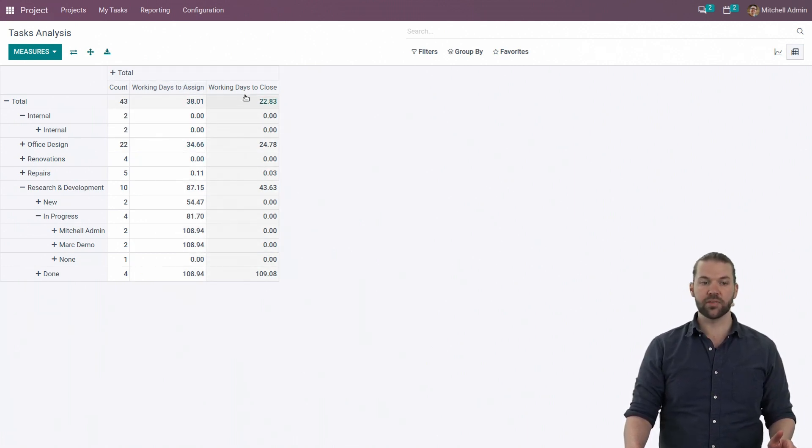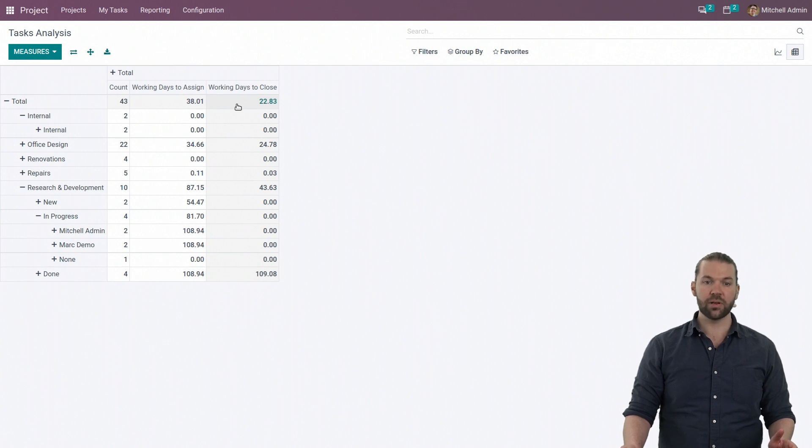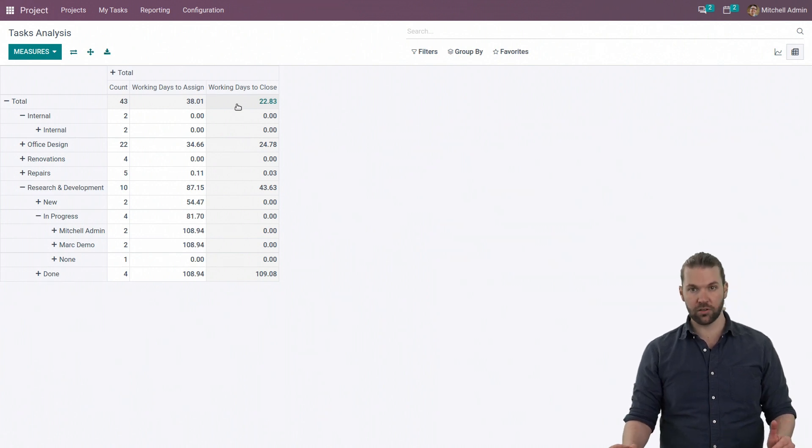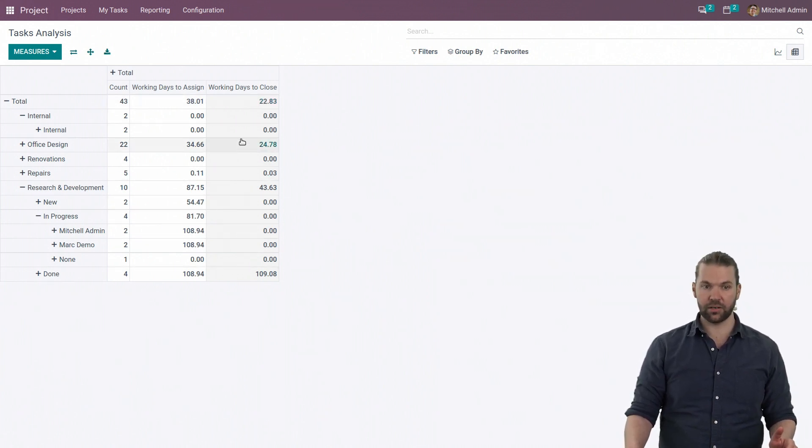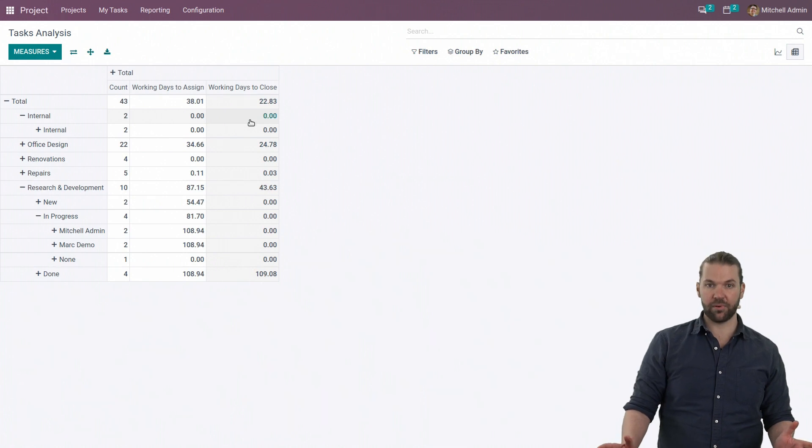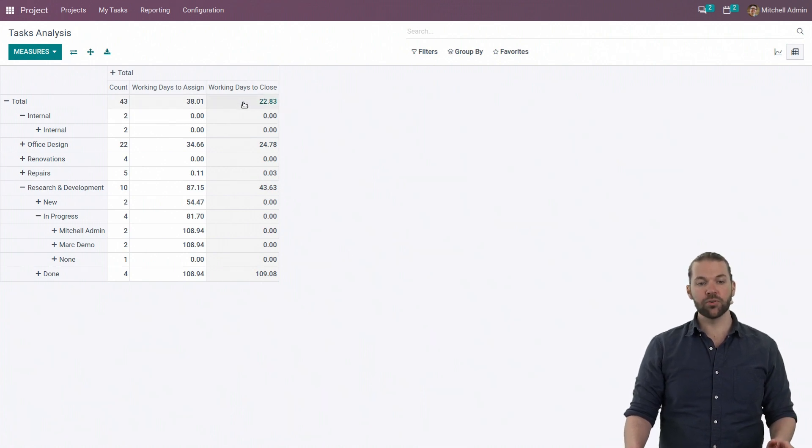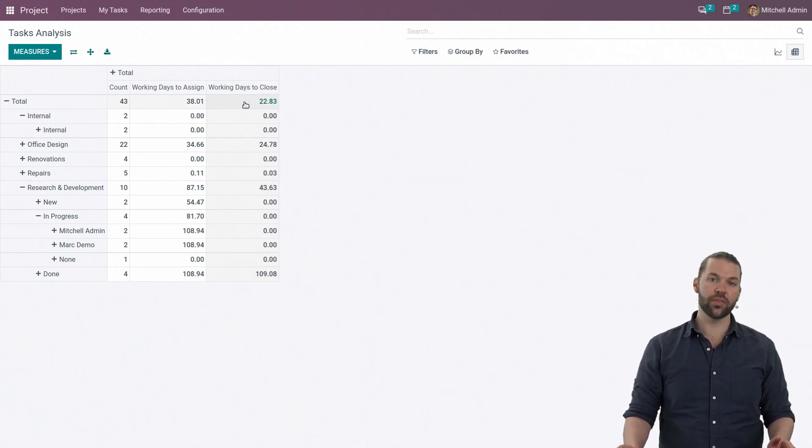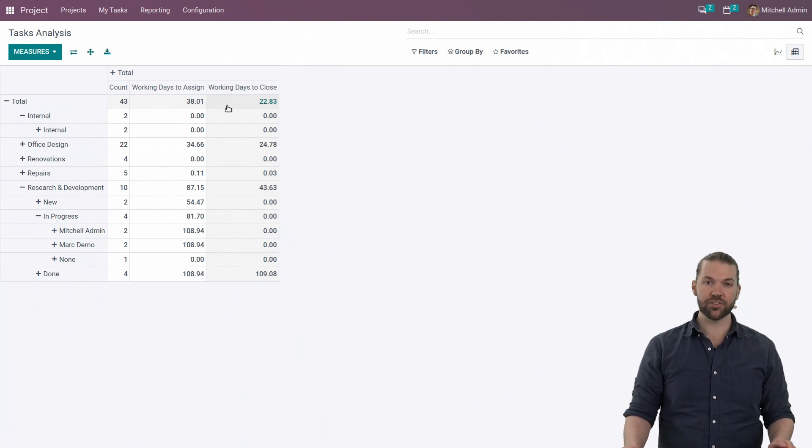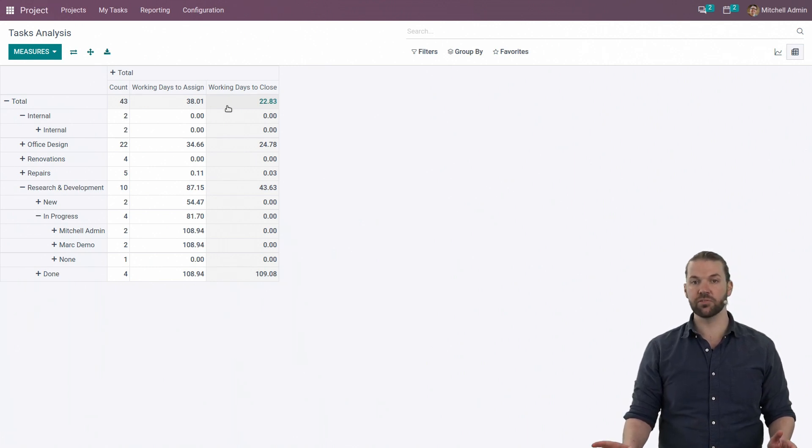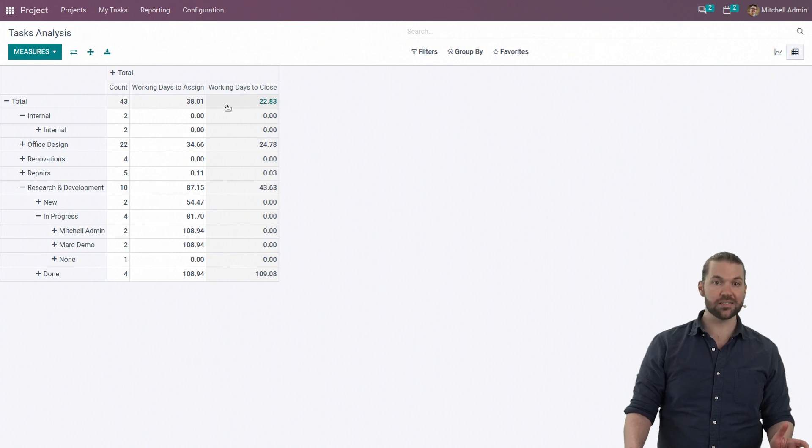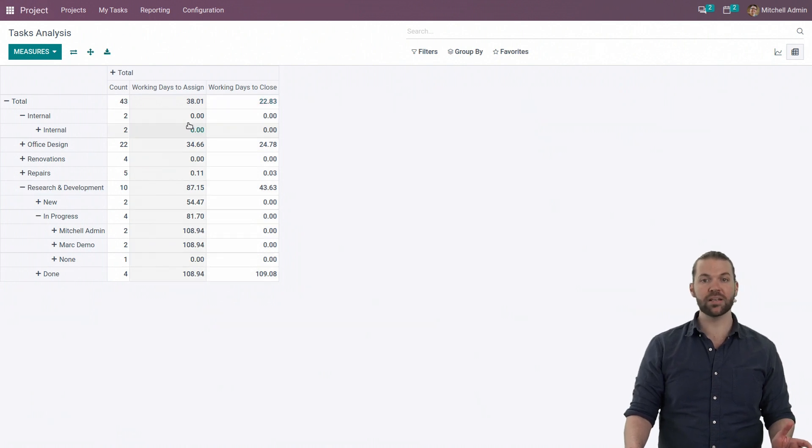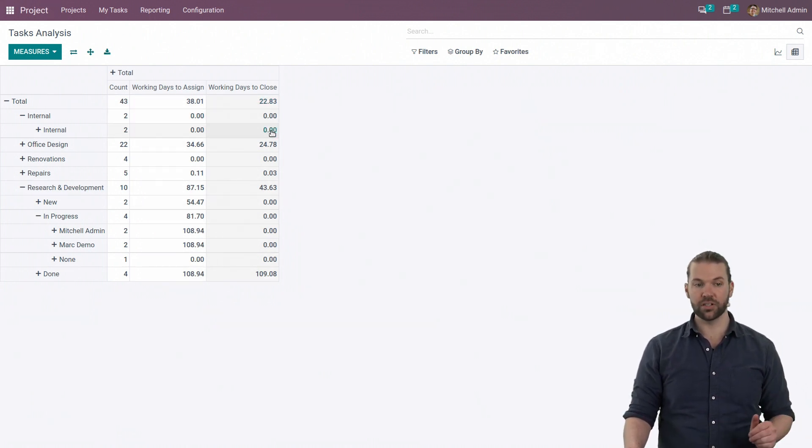The same concept applies for the days to close. So the moment it is open to the moment it is closed, how long has that taken? Now, the way Odoo determines whether it's been closed or not is whether the stage on the project is set to default to fold. If it's folded by default, that is a done stage. And the moment a task moves into that stage, we're good to go.